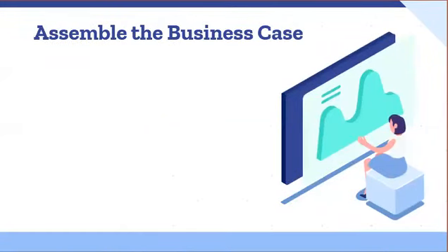Then we need to assemble the business case. Not all business problems or opportunities require a formal business case. Executives in an organization may approve programs and projects based on competitive pressure, government mandate, or executive inclination. In those cases, a project charter to initiate a program or project is sufficient.